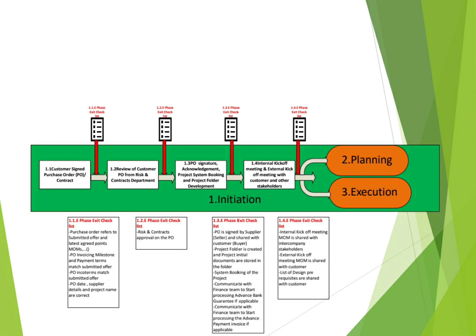If you don't have it, you can mention that after this meeting, you can put a due date for the submission of the prerequisites list. Also, you need to discuss the milestone dates with your customer. If they are not available with him, we will also put a due date so that your customer provides these milestone dates. All of this is very important so that you can proceed with the planning and execution of the project.